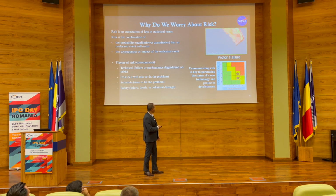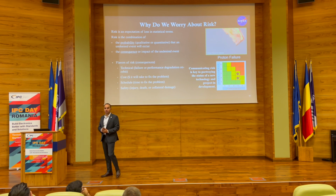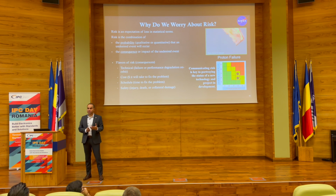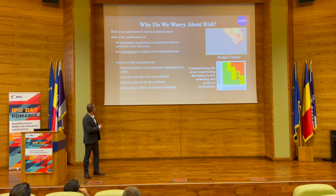So that's a little bit about risks. And we define risks as technical risks, safety risks, or programmatic risks. A risk can be a cost risk or a schedule risk. So that falls under programmatic.